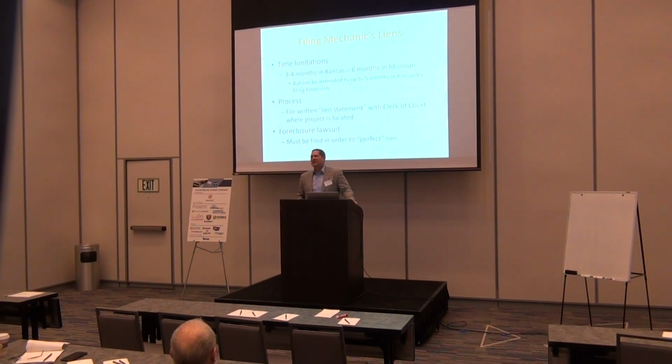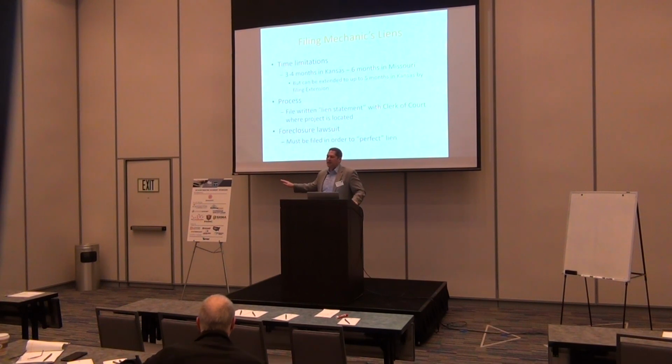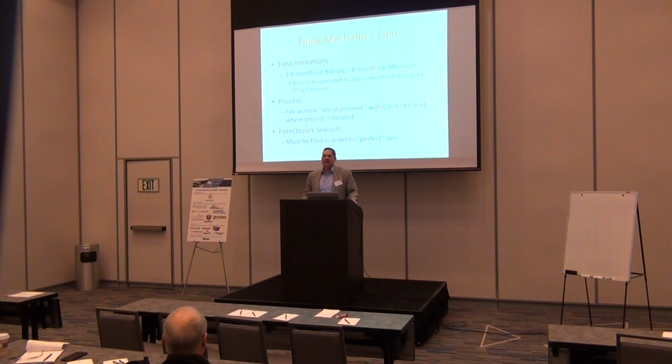Well, it depends on when you call me which day we're going to use. Well, what would you want? The ideal date to use when you docket these deadlines is essentially your substantial completion date. So if you're the carpet guy, the last day you lay down carpet, not the day you went out there to do anything else. Use the earliest date possible, because that can't be argued. But if you're out there doing punch list, it's probably covered, but somebody's going to argue it's not. If you're doing warranty work, that's pretty clear it's not going to justify the time period. So use as early a date as possible.